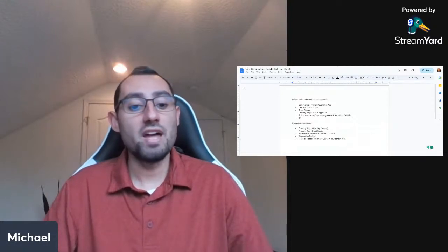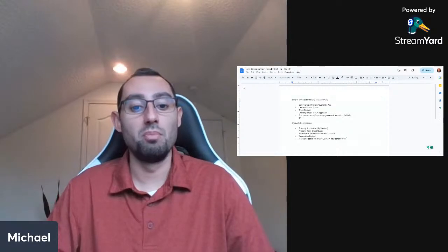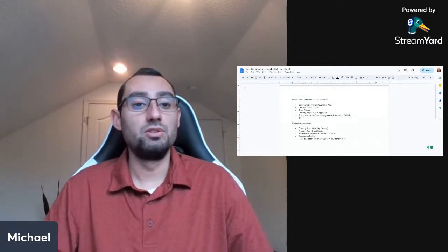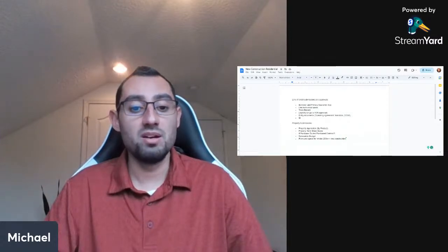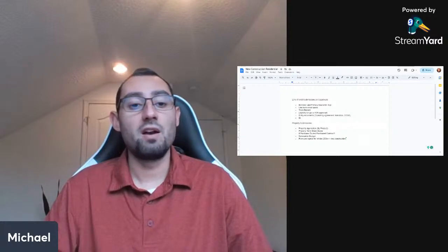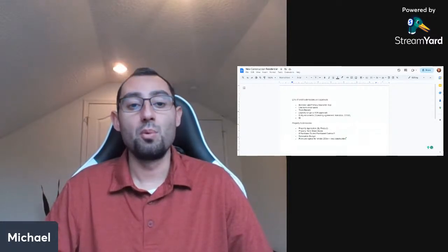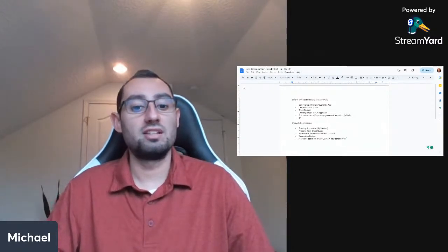Note that costs unrelated to your construction or the property cannot be included in your budget. So anything unrelated, that's common and that's obvious. And that includes, in case you needed to know this, interest reserves that shouldn't be there, any kind of fees, as I said earlier, that aren't accompanied by the carrying costs and are completely separate from what you're building, the realtor fees, which are not included in that, they did their part, and closing costs, etc.